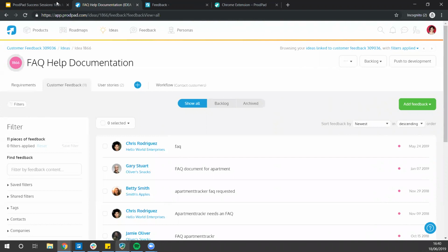It just helps us narrow down not just what the user is trying to do, but what it would look like for different users, because as you know, we have 3 different types of roles. So a typical gherkin user story based on a piece of feedback would be, as an admin, I would like to do this in order to that. But as a reviewer, I would like to do this in order to that. So it just helps us narrow down not just how it's being built, but also how it's being tested.